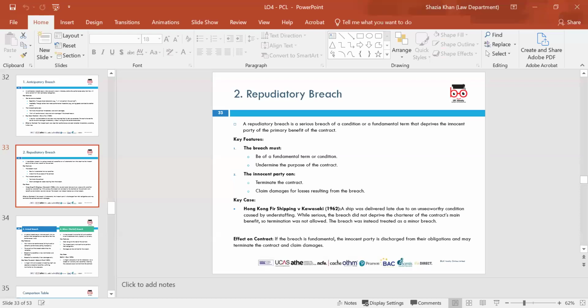Other types of breach still require the innocent party to adhere to the contract terms, even if they are successful in obtaining damages. For example, if a builder's work required modification by a new contractor, the injured party might receive damages, but would still be liable to pay for the work.